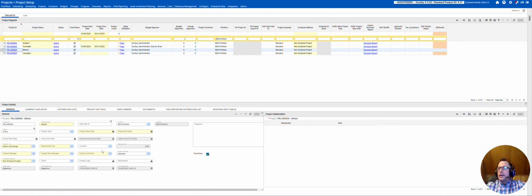Athens now is in the session context of this session. If here they're set to same, it won't post that information up to the session context, which is like a sort of metaphorical cloud for my user session right now. If told by an object that has a given parameter set to cross, hey, if there's another thing that the user goes to that has that parameter defined called root cost object, I will start off with root cost object equals Athens.